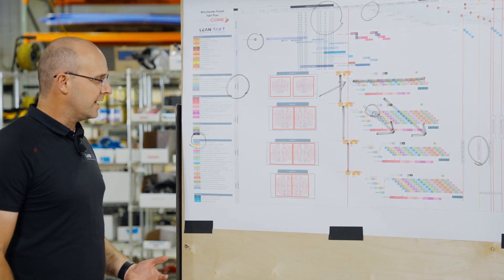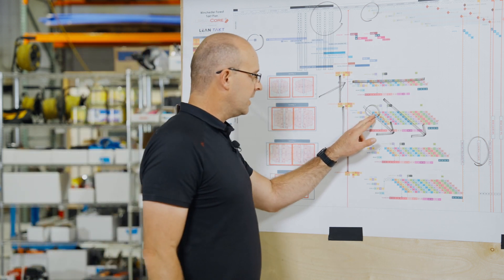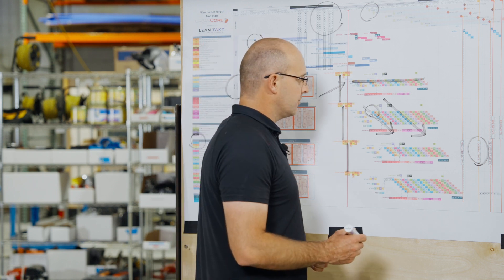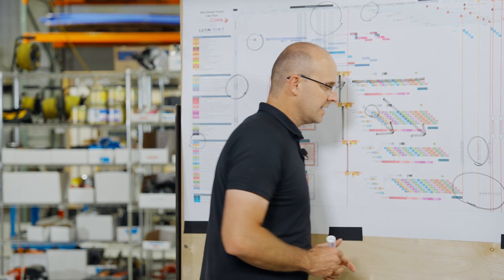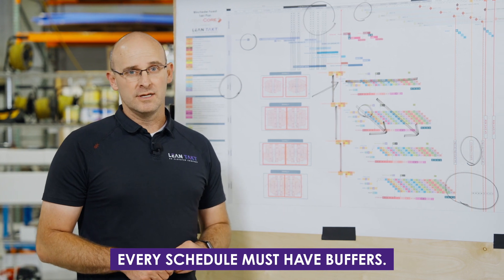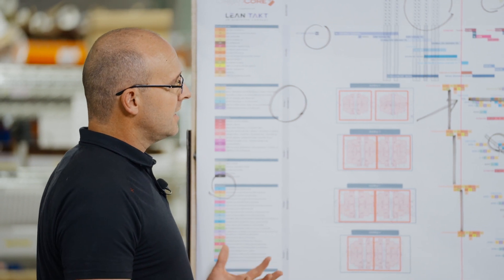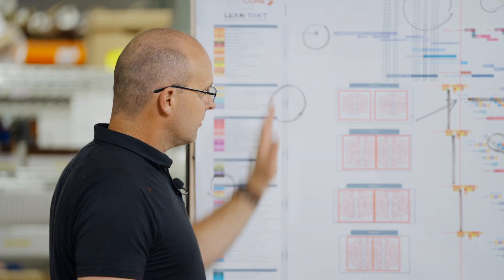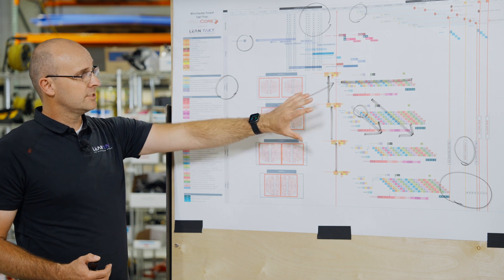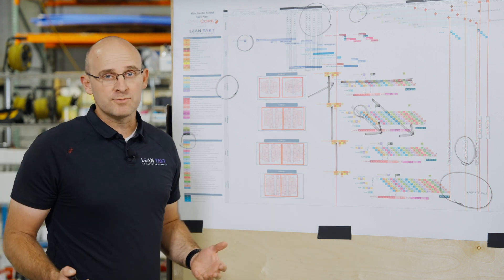In its simplest format, you can ask: where am I? What is my contract? What is my color? Where am I, does it work, and do the phases work together? One of the most important things to note are the buffers at the end of the schedule — every schedule must have buffers in order to work properly and to absorb delays. So at its most basic form, this is how you read and understand a tact plan: it's time by location, the colors are the crews or the trades, and everything else shows the interconnections, relationships, circumstances, and buffers. I hope you've enjoyed this brief video. On we go.